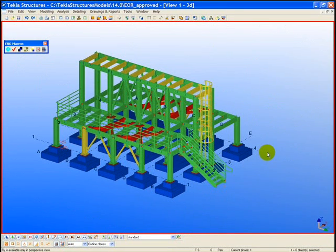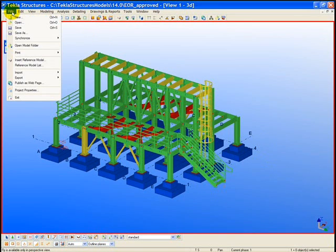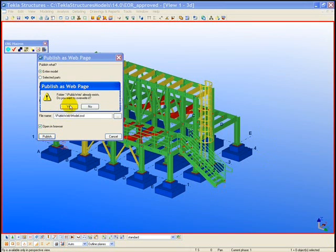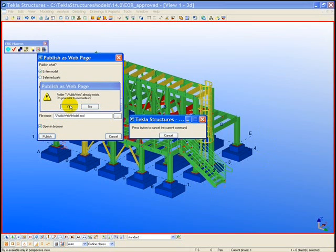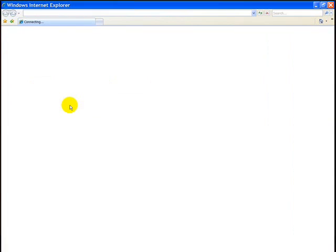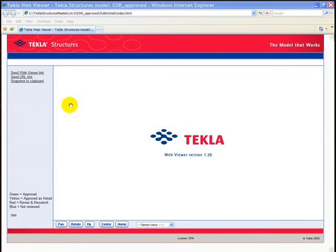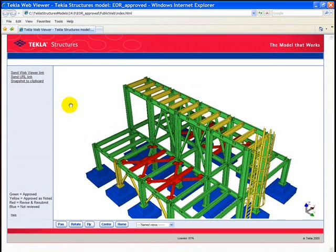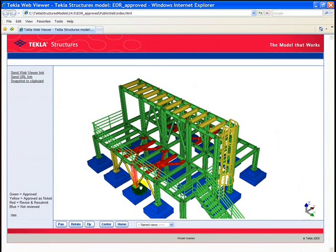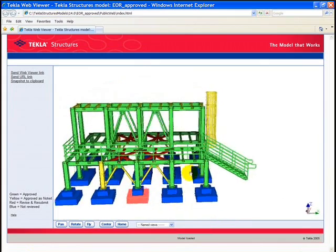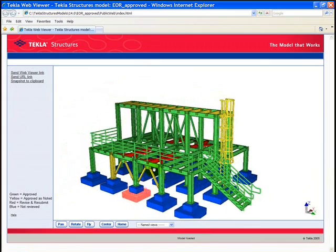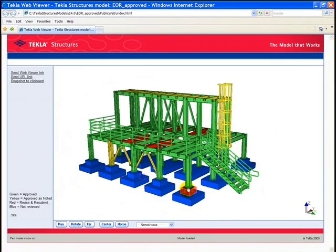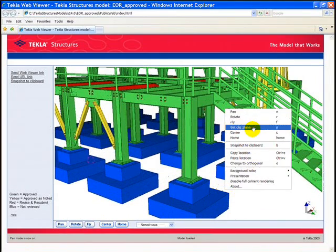An effective way for the structural engineer to communicate the approval status of a given submittal is by publishing a web viewer model. A web viewer model is a free viewer from the Tekla software. So for the owner, architect, or contractor who does not have the Tekla software, the engineer can just email them this web viewer model to view the approval status. We can see the colors have come across for the approval within this model.